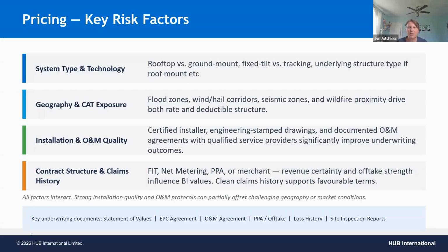And of course, looking at who's responsible for what, even in the supply agreements for the equipment that's being provided. So making sure that you understand who's responsible for what and when. Are you responsible for when it hits site? Are you responsible for the inland transit? Are you responsible for when it leaves the manufacturing facility?